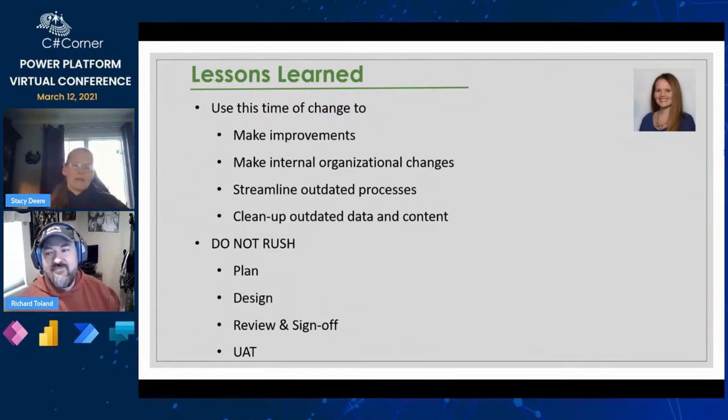If you do all that and everybody is on board, it leaves a lot fewer things that come up in your UAT that have to be changed. So make sure you're inviting the right people to the meetings, explaining it, documenting it, showing them, having them say, yes, that's great, and sign off on that bad boy. Then when you go through UAT, you may have some minor tweaks that need to be done.